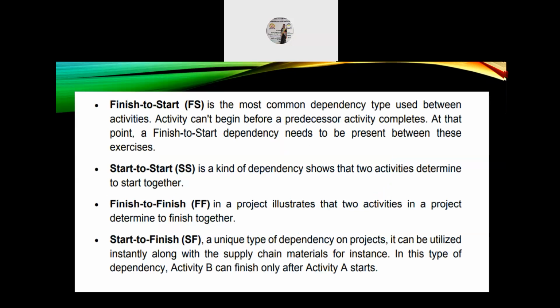First one, finish to start, that is F to S, is the most common dependency type used between activities. An activity can't begin before a predecessor activity completes. Before the earlier activity completes, you can't start a new activity. So at that point, a finish to start dependency needs to be present between these two activities. Next, start to start, that is S to S.